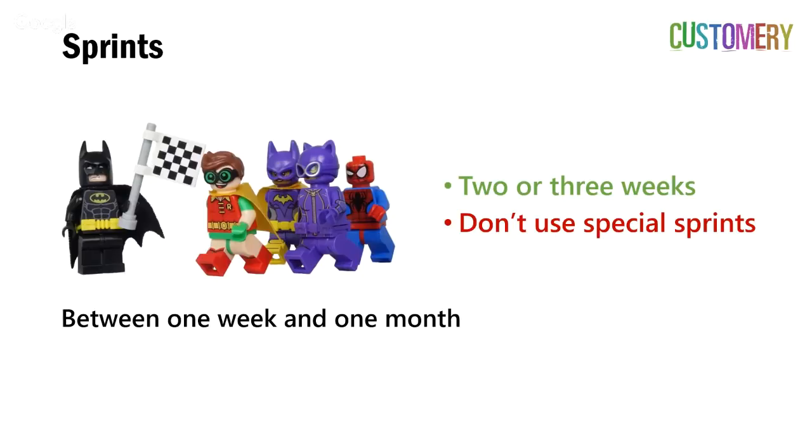And unless you've got a lot of automation and you're a very mature Scrum team, working at that pace can be quite a challenge. But I've often seen mature teams shorten the length of their sprint from 3 weeks down to 2 weeks, heading towards 1 week, if they can get that level of automation up so that they're freed up to focus on the software development. I'd recommend starting out with 2-week sprints.